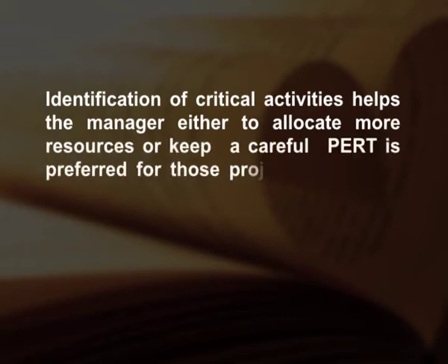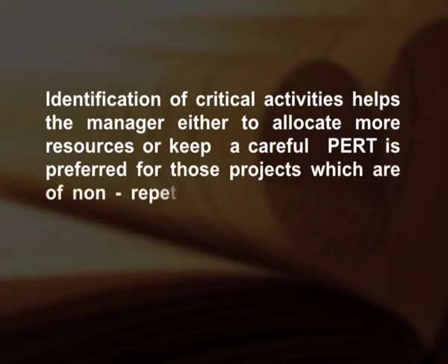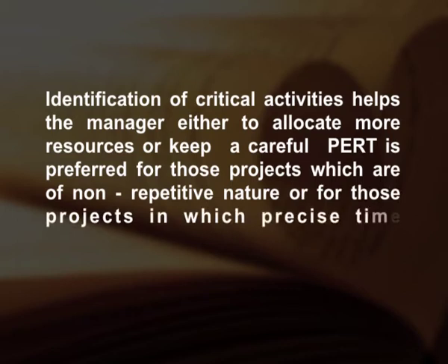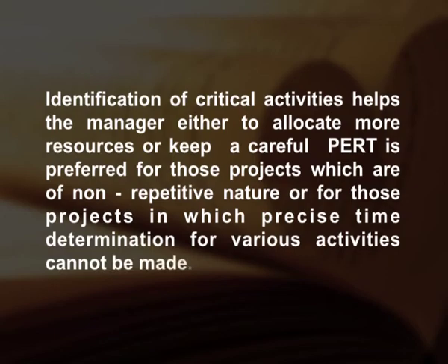PERT is preferred for those projects which are of non-repetitive nature or for those projects in which precise time determination for various activities cannot be made. In PERT, it is assumed that the time to perform each activity is uncertain. PERT incorporates the statistical analysis in determining time estimates.